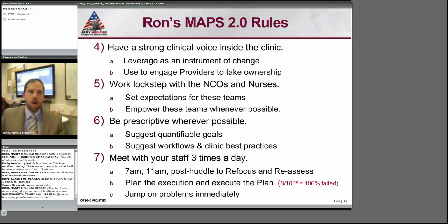Also, you have to make sure you stick to your game plan. You plan the execution and then you execute that plan. But with a caveat, don't fall in love with the plan. You might need to make some alterations. One of the biggest problems I see with plans is the fact that they shoot for the moon. You have to keep scope in mind. If you bring in a clinical workflow analyst and they're talking about, okay, we're going to completely redesign the call center, you don't have time to get after that.